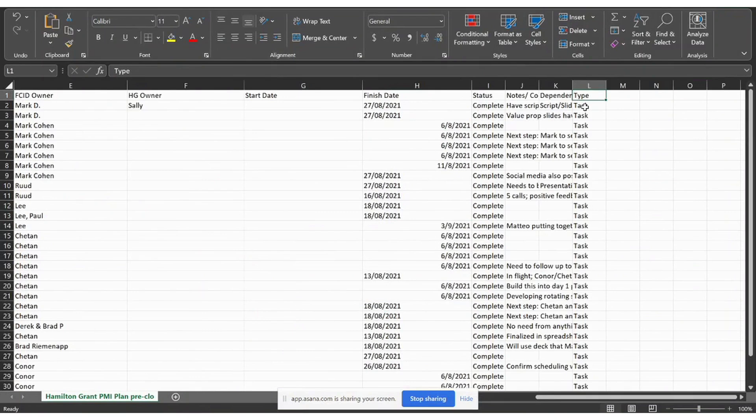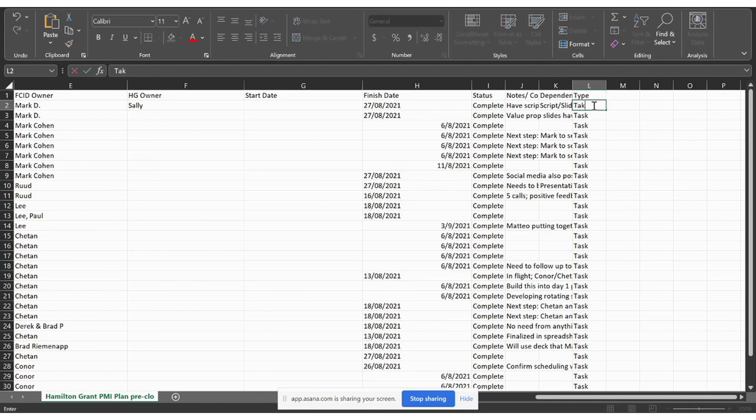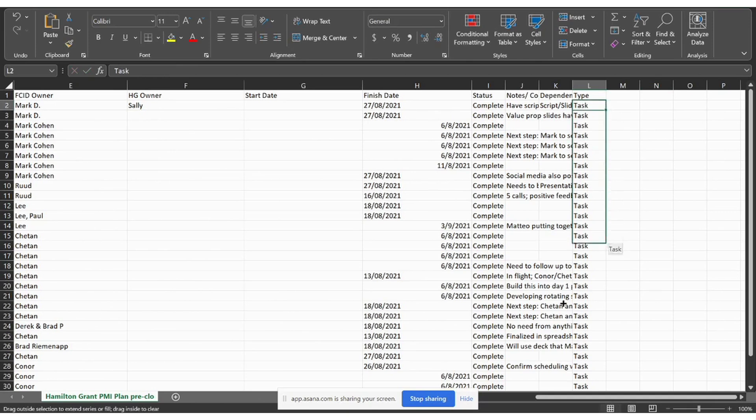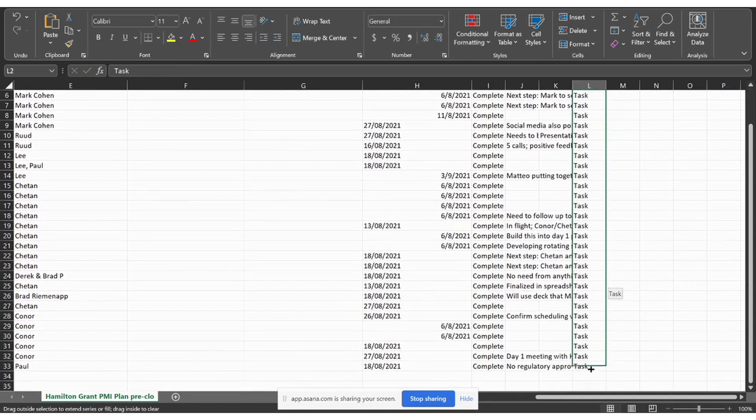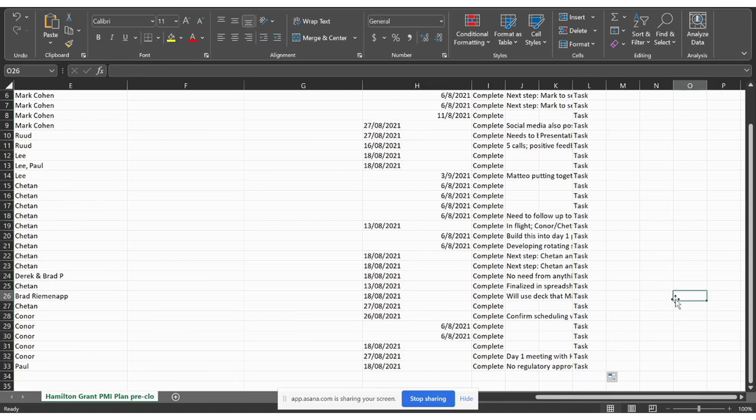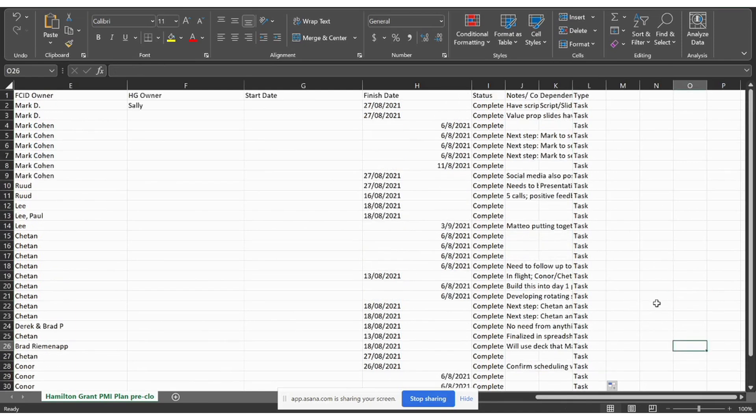So it must have a title field or a field that has the task description. It also must have a field that says type. And for me, all the tasks, all the types are tasks. So I just type in tasks here. And for all my tasks, I just want to drag that down so that FreshService knows the type of task.